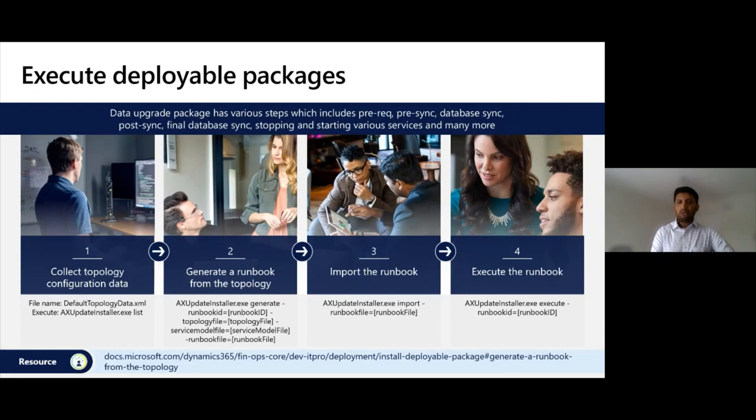What happens when you do the data upgrade package in the dev environment? It prepares your source database for the upgrade process, and then it changes the metadata from AX 2012 to D365 and the version to which we are upgrading. It identifies all the obsolete fields. It introduces the unique indexes or any metadata changes that have been brought into the D365 environment on your data.